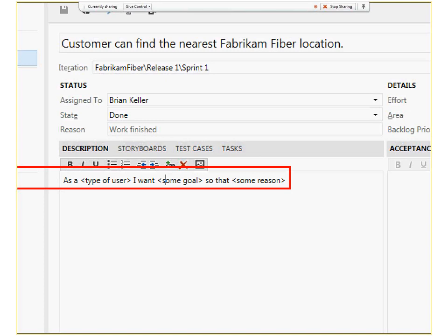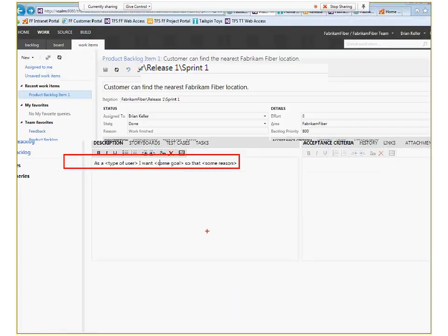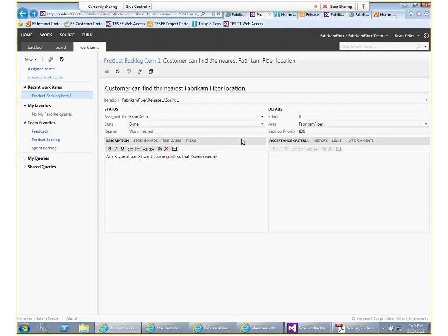Well, what that translates to is that this is essentially the prototype of a user story, if you're familiar with user stories. So PBIs can be user stories, and Microsoft by default added that text as a way for you to have that shorthand if you need to, without having to bother typing it every time. But it doesn't necessarily have to be so. You can just take this down and write whatever you want here in terms of defining the PBI. What really matters, though, is that the person that creates the PBI should be the product owner or a business analyst working on behalf of the product owner, right? And when I say that, it means that for purposes of the Scrum team, the business analyst will be the product owner, and the other person then becomes a chicken or a stakeholder.